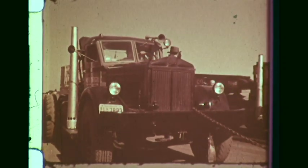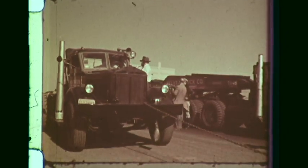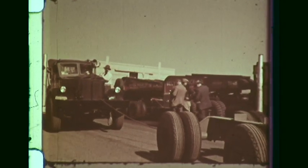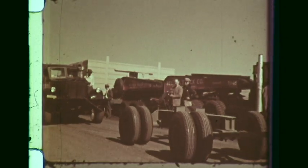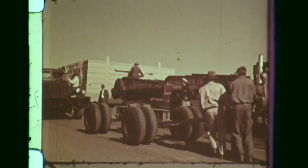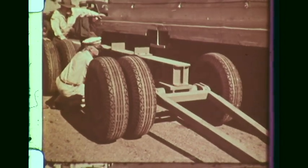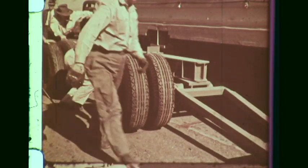Many problems had been foreseen and special equipment constructed months ahead. This truck, also used to help push the trailer up steep grades, is now pulling in one of 2 dollies which are to be bolted to the sides of the trailer so that the heavy load can be distributed more towards the stronger side of a bridge that lies just ahead. Each of these dollies has 8 heavy-duty tires and now enables the load to be distributed over a total of 58 wheels.